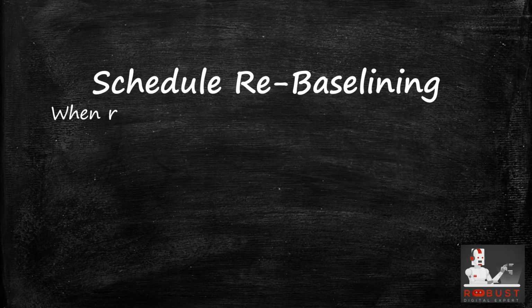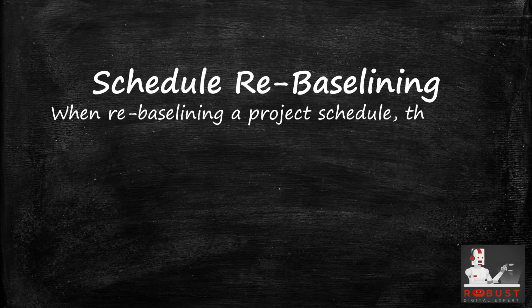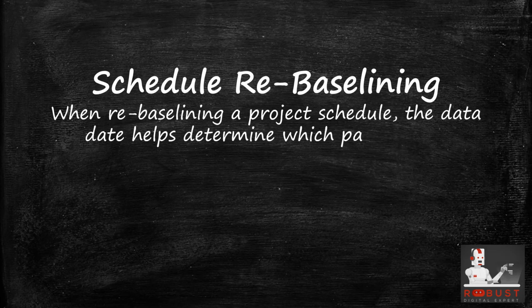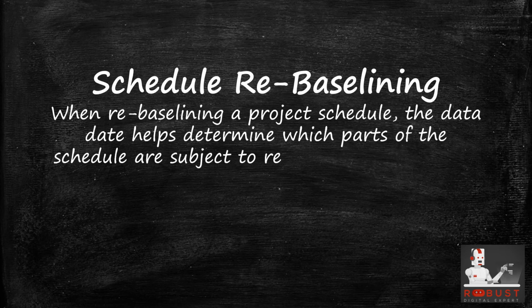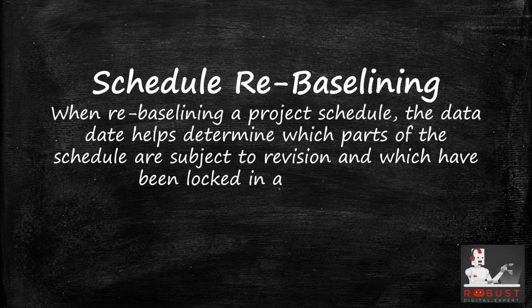Schedule rebaselining. When rebaselining a project schedule, the data date helps determine which parts of the schedule are subject to revision and which have been locked in as completed.